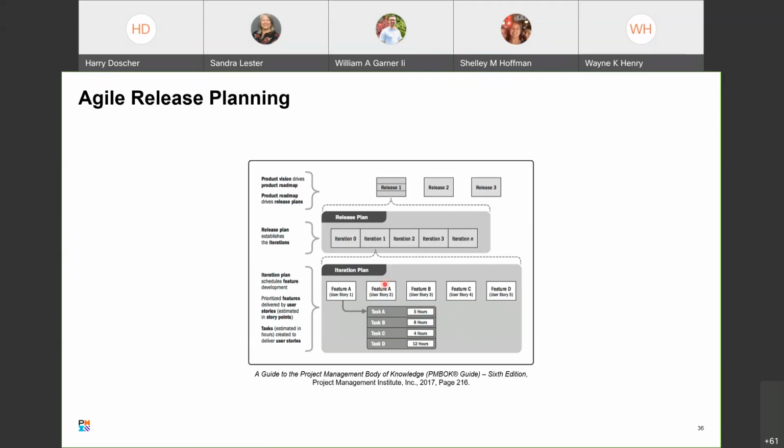can you also do user story 2 at the same time, or do you have particular people who have to work on these particular tasks in order to deliver in that time frame? Also, if you want to do feature A and feature B, for example, in the same iteration, will you have the testing resources to be able to verify that both user stories have been implemented correctly? So there are trade-offs. You need to keep those in consideration.